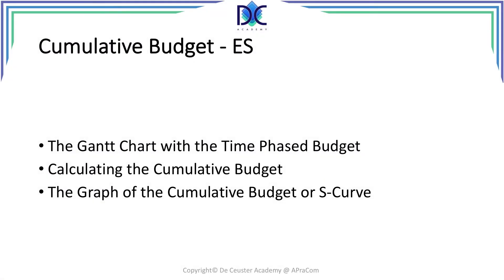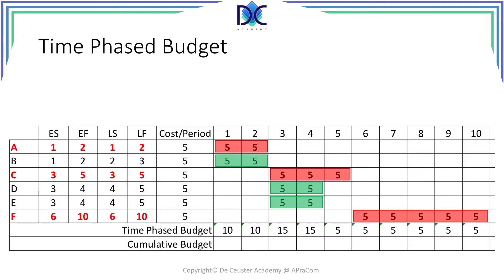We finished the time-phase budget in early start position. Now we will do the same and calculate the cumulative budget. We start with the Gantt chart we created at the end of the previous session. Here we calculate the cumulative budget and then put them in a graph together with the time-phase budget. You can see the same Gantt chart obtained at the end of the previous session. We have the time-phase budget — now we have to calculate the cumulative budget.